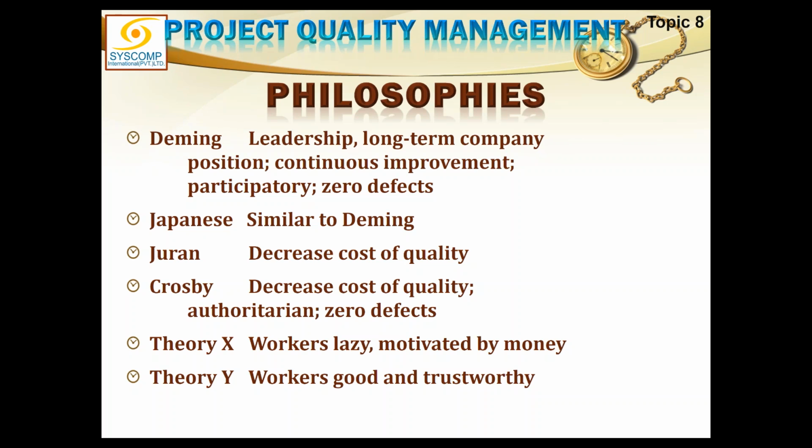So actually Deming worked on a lot of things, and the biggest amongst them was continuous improvement, the Deming cycle, the plan, do, check and act cycle, which we said we do iteratively, so the processes can improve continuously forever. He also gave the concept of zero defect. Americans were very fond of using standard deviation, and they used to say 99.74% is good quality. But the Japanese changed the concept. They said no, that doesn't work for us. We go for zero defect. There should be absolutely no defect coming out of a system.